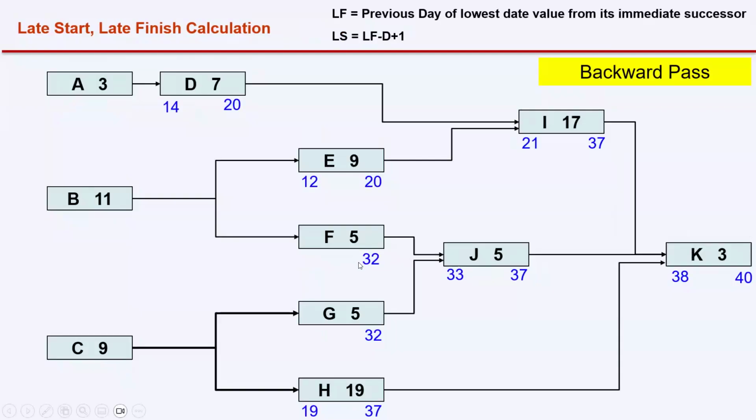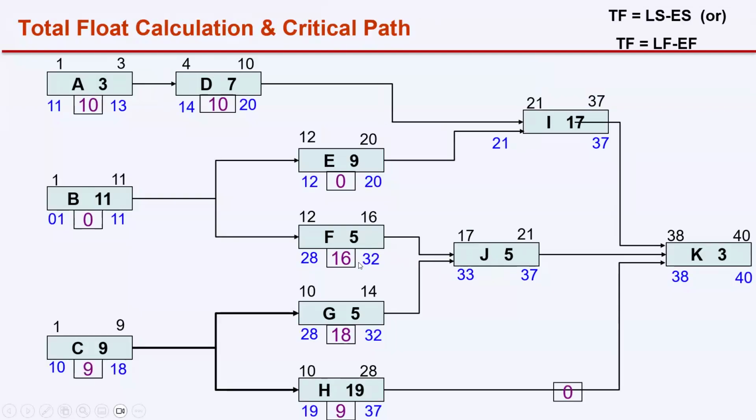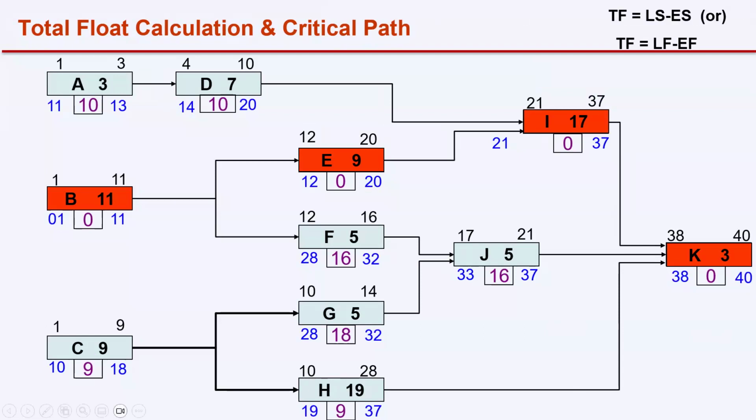By the critical path. Just a minute. Okay. Here is a critical path. Now assume I'm going to put F and J in parallel. Fast track. Is it going to reduce the overall duration? No. There will be no impact. It's a waste of time and money. If I crash activity I or activity E or B or K, or I put some of those activities in parallel, that will reduce the overall duration. So crashing and fast tracking a non-critical activity is waste of time and money.